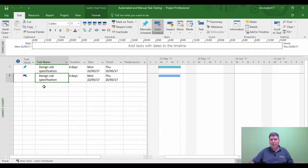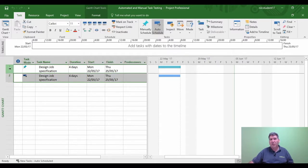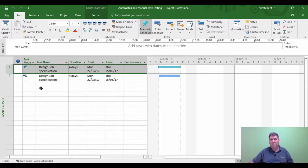When you've set your project up, the automated task will align itself to the automated controls. For example, one of the automated controls that Microsoft Project has is a project start or finish date. So if you change the project start or finish date, that's going to affect the automated task, not the manual schedule task.